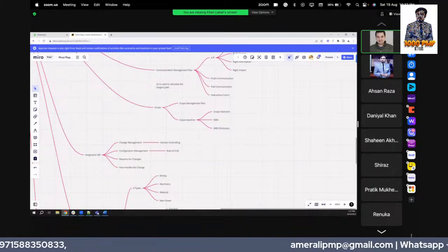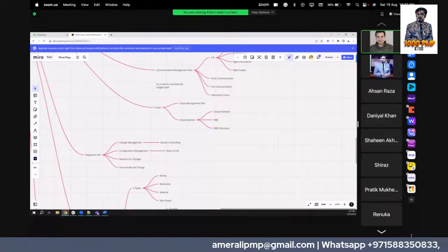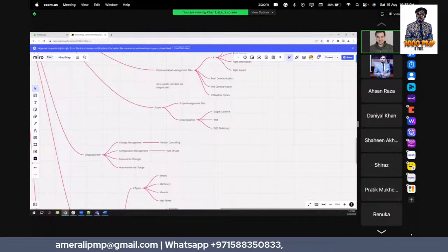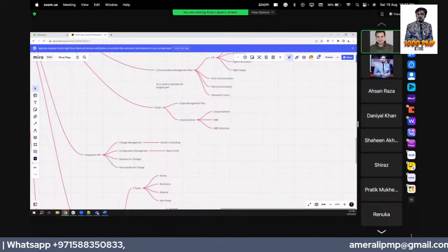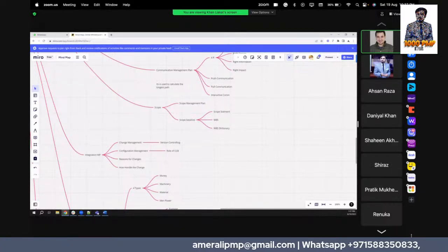So basically, the WBS says what the subtasks are that we have to perform and lay down in our plan. So it goes like 1.1, 1.2, which is the WBS. And then we make sure that the dictionary lays down what it means for everyone.